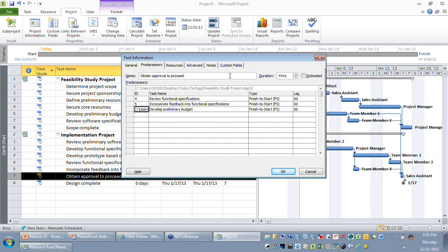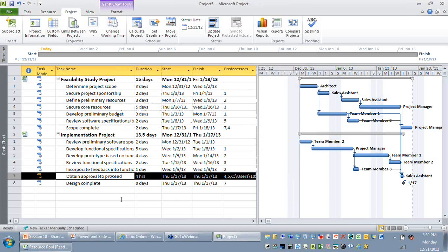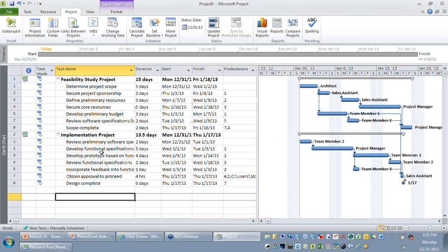Okay, so the point you need to remember is you should not change the file location, because now you have connected one project to another project. It is assumed that you will not be changing the file name or the location of the file when you're doing it. Good. Now we have connected these two projects, okay?